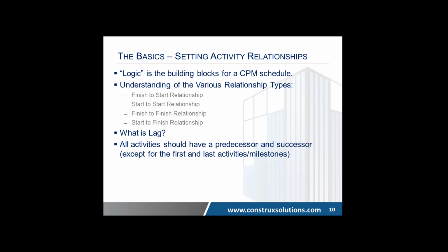If we're in a giant room, like the main floor of an airport, and the activity is mechanical on this main floor that covers a large space, you want your mechanical guys to get started, and then you want the electrical guys to follow shortly thereafter. You don't want mechanical to get 100% done before electrical even starts. And that's just to add efficiencies to scheduling.